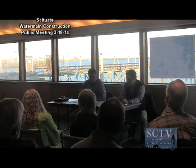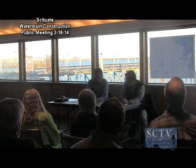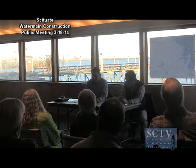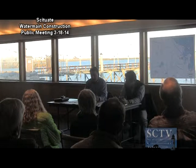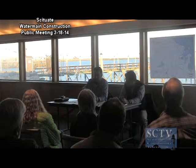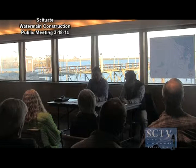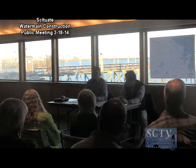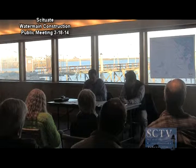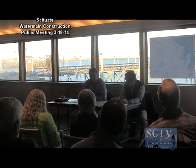One of the things we have on Lighthouse and Rebecca Road is there's three gates where that comes in, right where that little triangle island is in the entrance. The water line actually comes in an odd direction off Jericho Road. Mm-hmm. So what they're going to have to do is go out there and test pit it, find out where the line is. And we may shut the water off the whole point a couple times, because what we'll have to do is install brand new gates so that we'd have control of that water. If the gates are old, the issue that we have is we can't shut them off and turn them on, so we can't keep your water going.